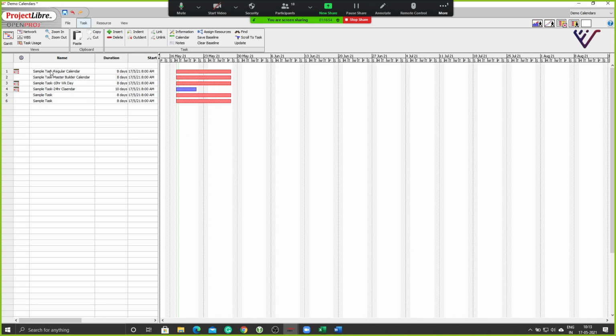Okay. I'm just showing it's the same task of a 10-day activity which I'm trying to do with different types of calendars. So you see, we are using 10 days as the base time required to finish an activity, but I'm applying a 24-hour calendar to this activity.